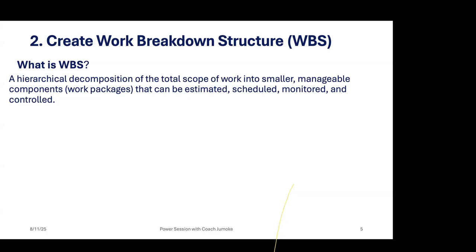You cannot estimate them as a whole, you need to break them down. For instance, if you said foundation is a work package, you cannot just say foundation, how much? Then you come up with an amount. You need to break the foundation down into the components or the activities that will help you get the foundation of a structure. You will use cement, you will use stone, you will use sand, you will use water, you will use laborers that will fetch water, you will use laborers that will dig the foundation. So these are the activities that will accumulate into the work package foundation.